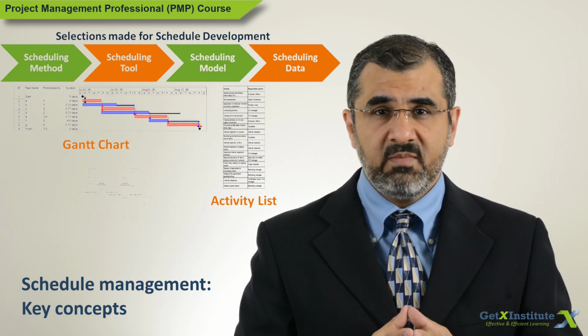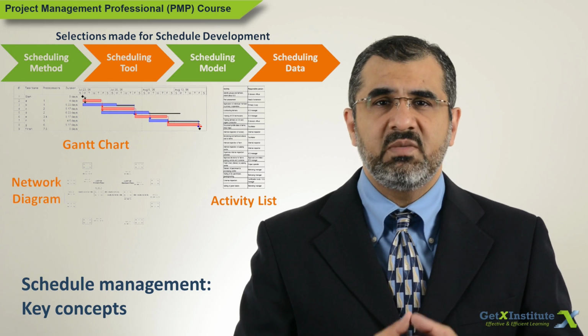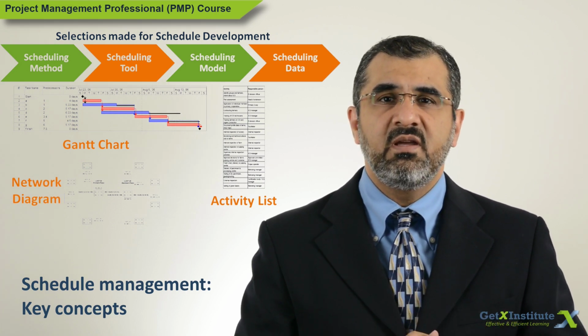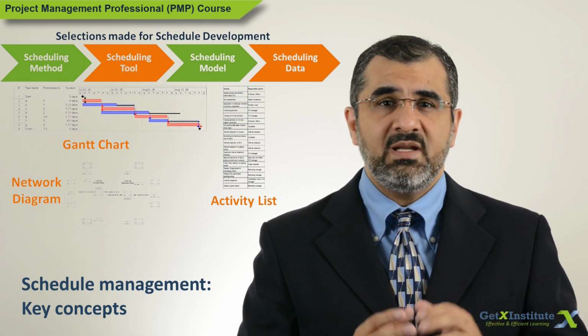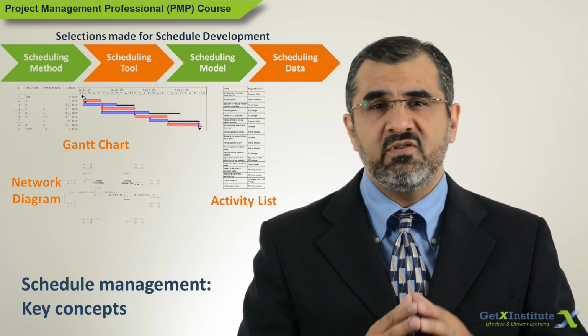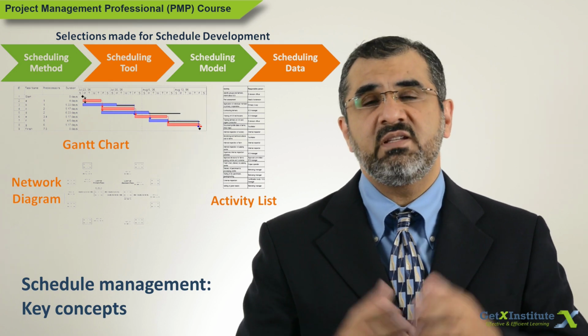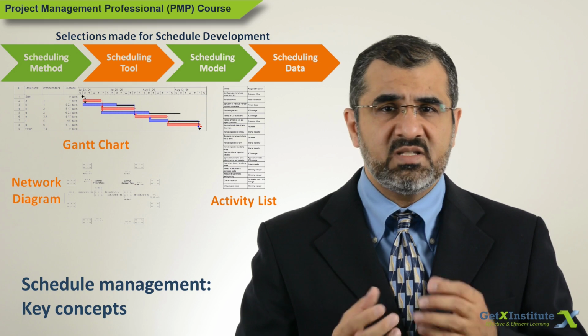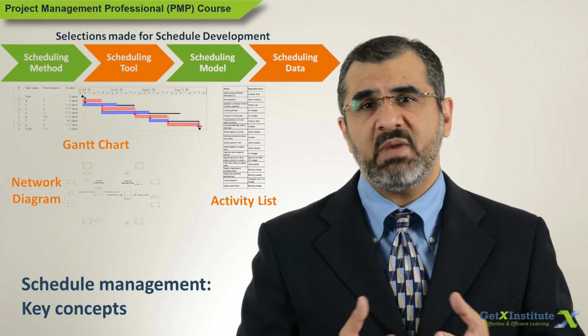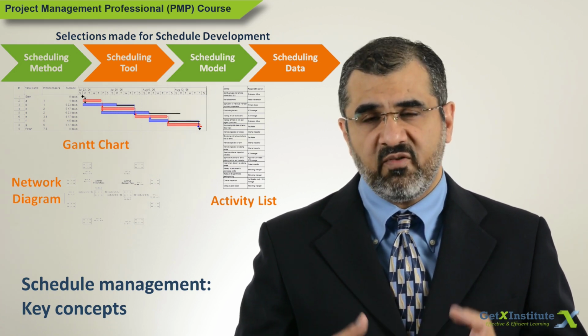A network diagram contains a lot of information besides showing the relationship between the activities. It is a logical diagram, but it is not easy to understand and visualize when the number of activities is large. Software tools use network diagram and specifically precedence diagramming method to build schedules and perform calculations.